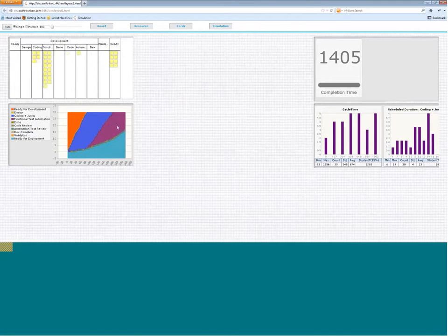And you see even in the cumulative flow diagram, the functional test automation lane, which is the purple lane, work getting piled. Really, if you just had the policy that okay, I will let the designers also act in the coding lane, that would not accomplish as much benefit. And at the same time, you can see that testing, which is the validation lane, things are not getting bottlenecked here.